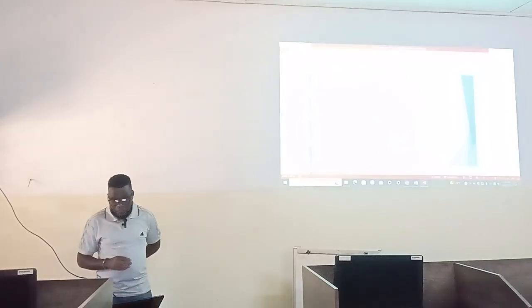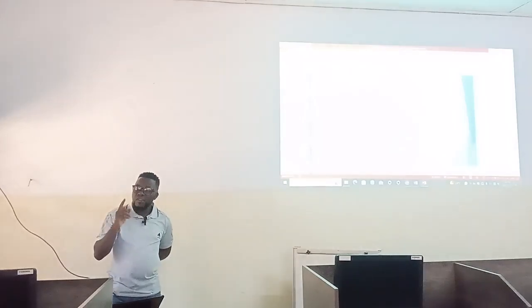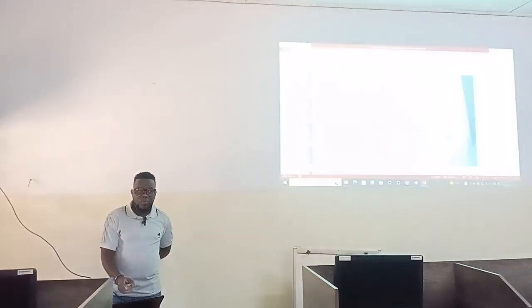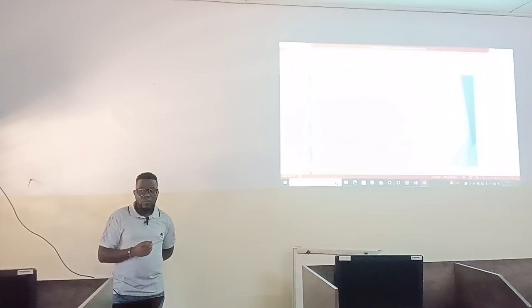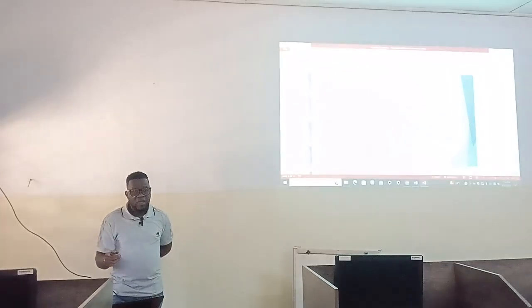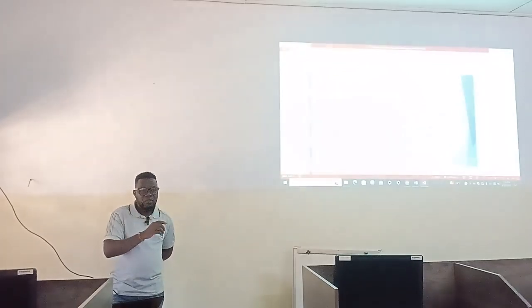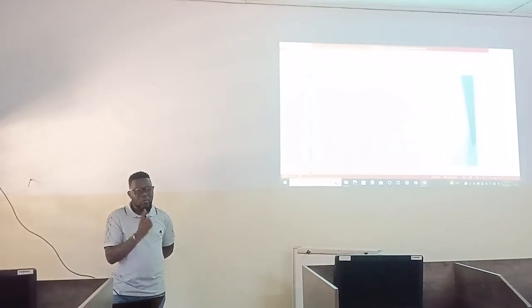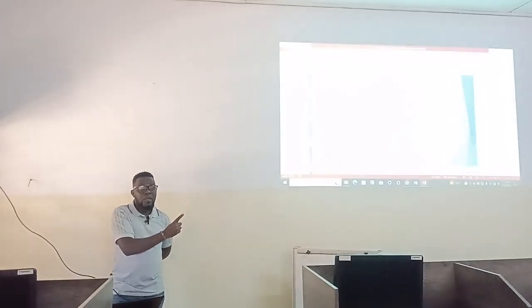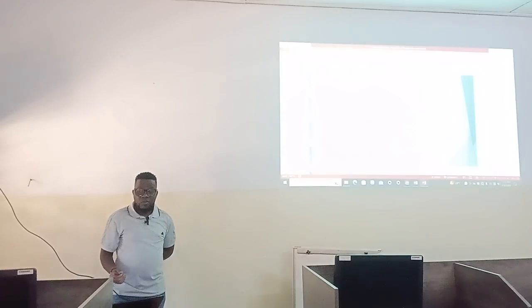Before we go far, take note that despite the fact that this is a document that is there to guide us in the successful implementation of whatever we're doing, this document is not binding. So it's different from the contract. We're together, right? Contract management plan and the contract document, highlight the distinction. The contract is binding, whereas the other one is not binding.